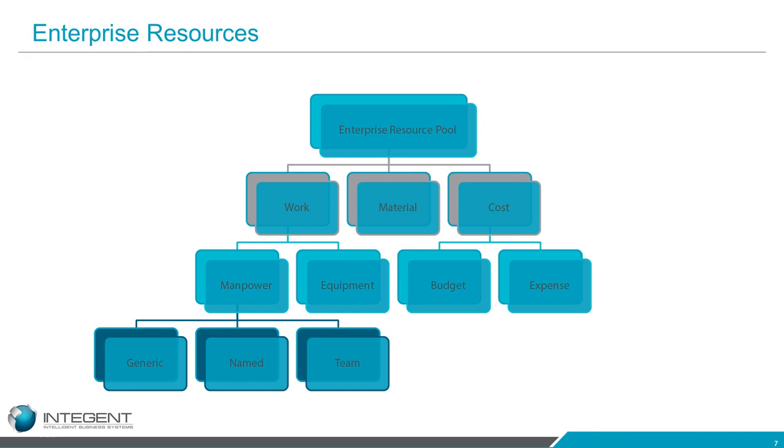Both of those, of course, use the Enterprise Resource Pool. The Enterprise Resource Pool is created by administrators, or maybe even possibly a resource manager. Typically, it's an administrator that does it. They enter resources into the Enterprise Resource Pool. They could be synced with Active Directory if you needed to. Otherwise, you can manually add them to the Enterprise Resource Pool if you're not using Active Directory, all right?